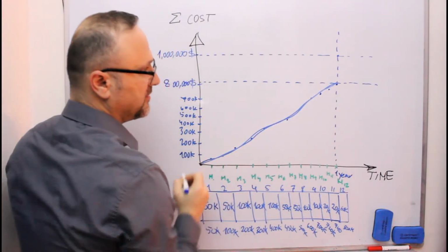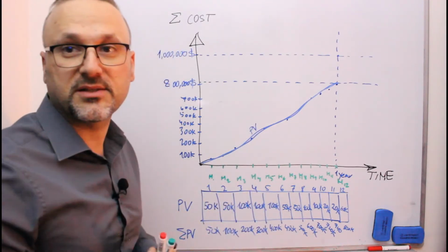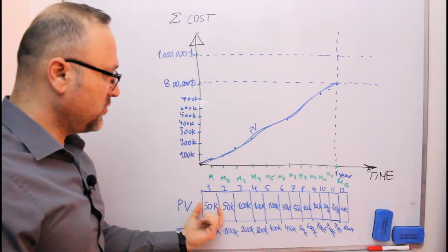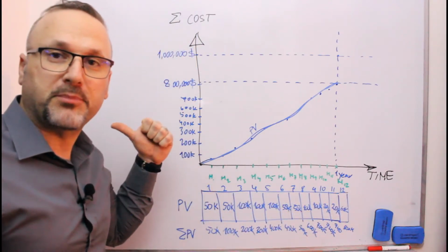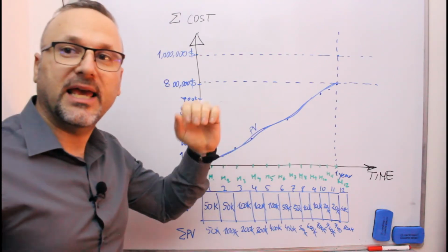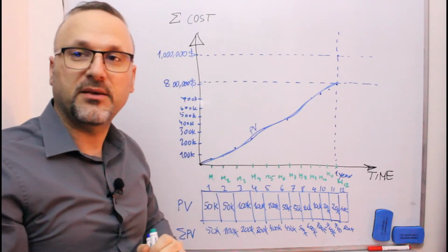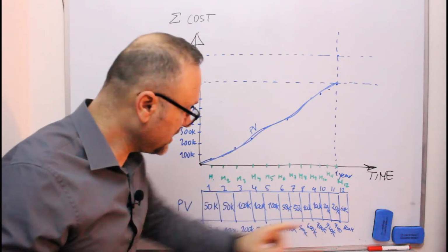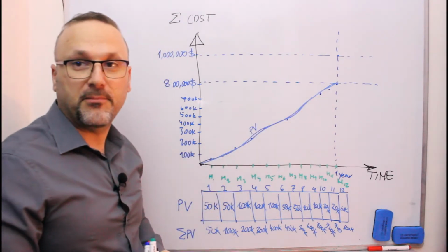This is the S-curve. And this is the S-curve of the planned value, because this is the accumulation of the planned value. Those are the figures where we estimated each and individual one from the project schedule, each task, where it was planned, and when you take the sum of each period, you will see the tasks planned and the cost planned. So the cost planned over here, and the accumulation is here. You applied it and you get the planned value.